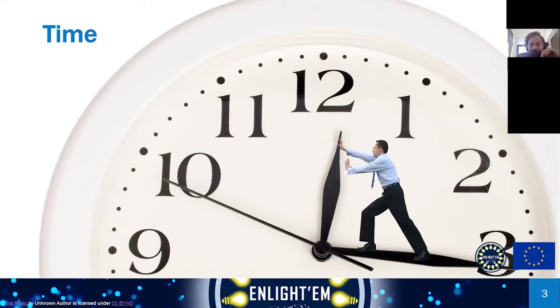So time being our most precious resource and generally being limited, when you embark on something that comes with inherent risk, like a research project where you don't necessarily know what the outcome is, I think it's very important when you structure your work that you start with the riskiest part of the project, or what you consider to be the riskiest part of the project at the time. And what that allows you to do is to allow yourself to potentially fail quite early in your project, and then be able to reconsider your project direction.